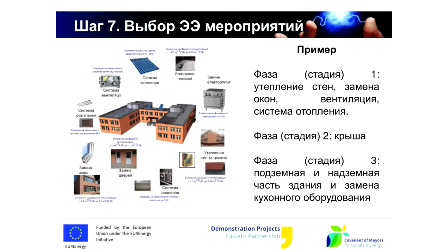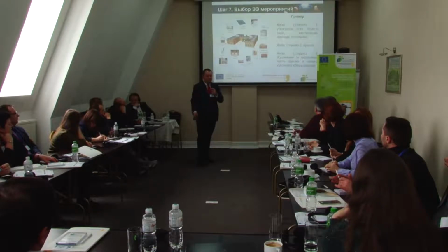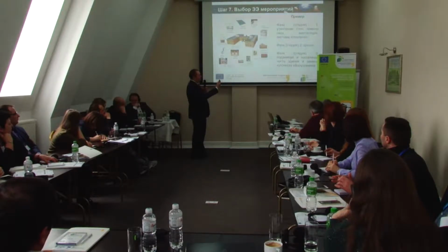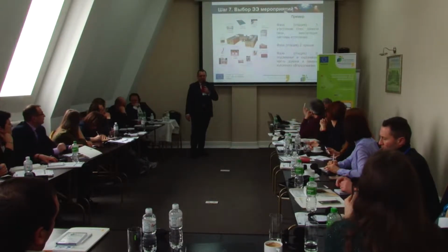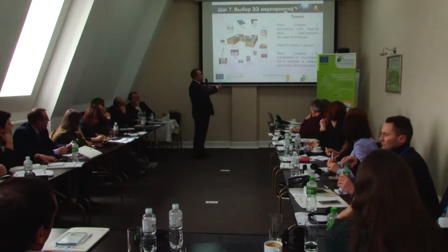The second phase, we do the roof, and the third phase, we do the underground and ground part of the building and replace kitchen equipment. So this is an example of how the project can be divided into certain phases or stages. For sure, it's just one example. You can combine different things.